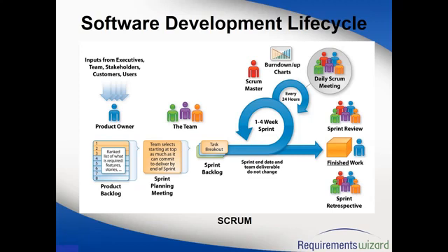The role of a BA is more of a supportive role, because the team may have a lot of questions surrounding the requirements. So the BA has to give requirement support and field any questions that the sprint team has. If they find any gaps, which is always possible, they have to go and fill those gaps. Let's suppose the BA missed capturing a scenario. In that case, somebody from the development team points out, hey, we don't have that scenario. So the BA will reach out to the product owner, discuss that scenario with them, fill the gap, and again go back and explain it to the sprint team. This is what the gap is, and that's what we will do.